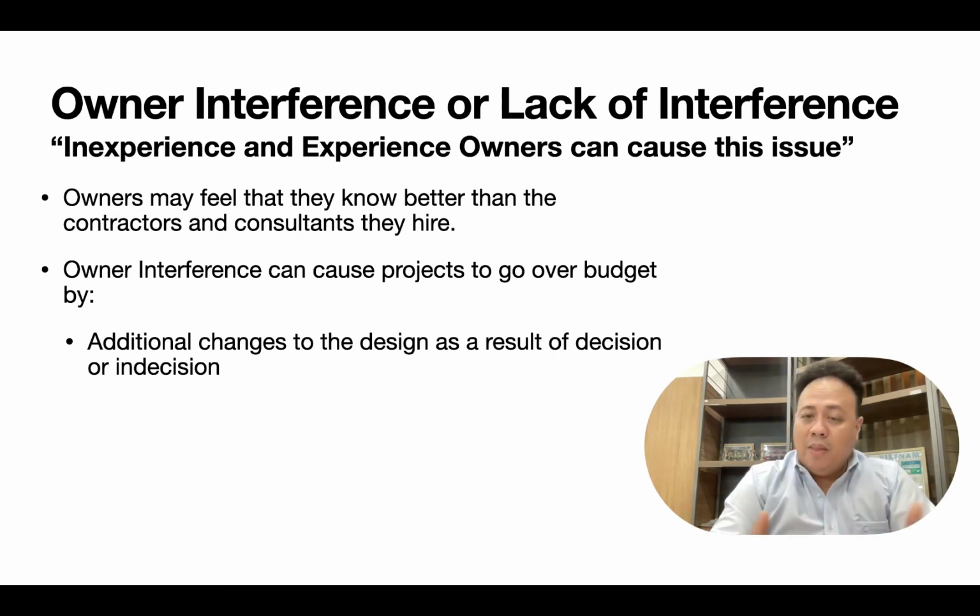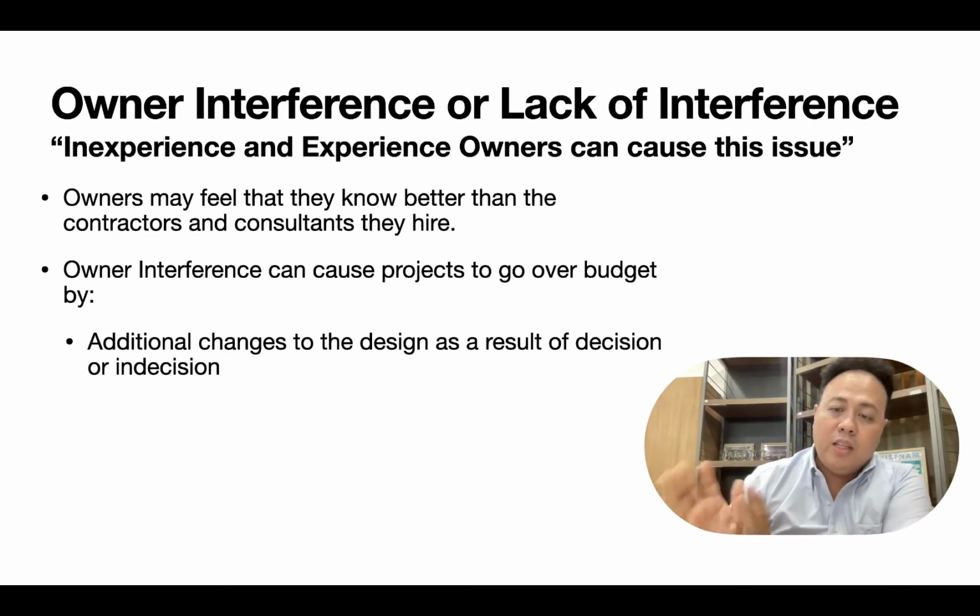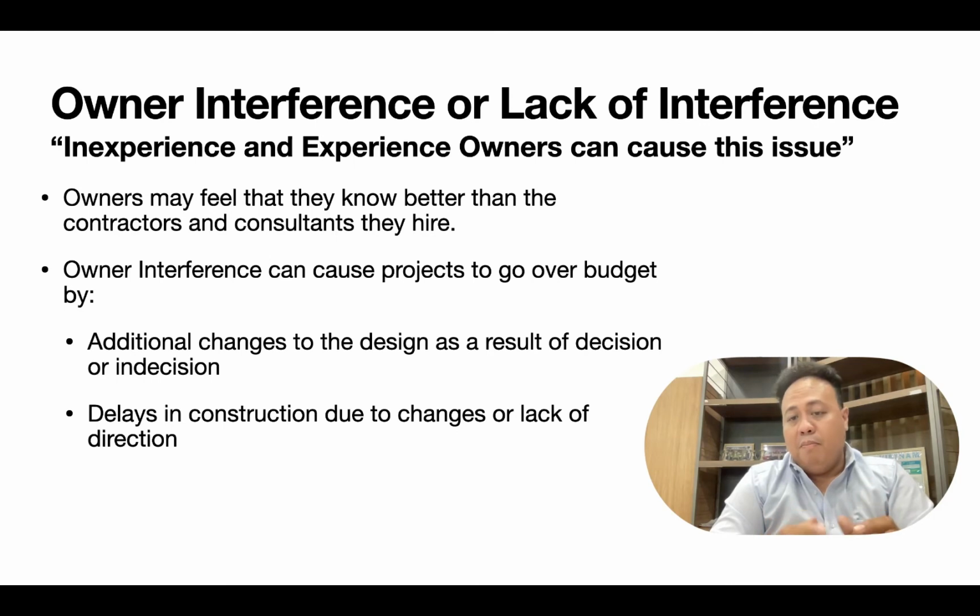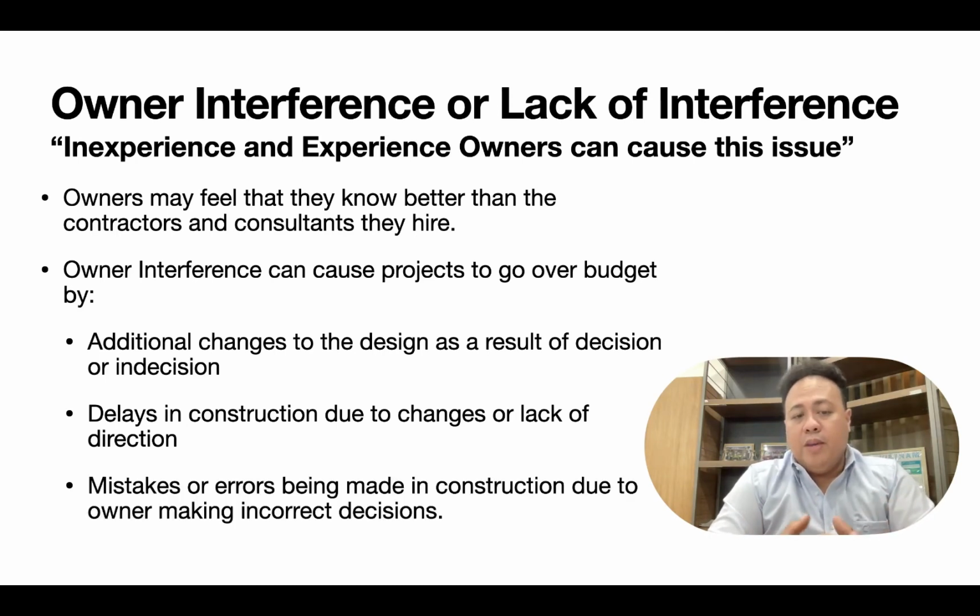It depends. But at the end of the day, the works on the job site will have to stop before further confirmation of the new design cost. The job site may stop work temporarily while waiting for confirmation of the change order. Mistakes or errors may also be made in the construction due to the owners making incorrect decisions. This may result if the owner doesn't engage consultants for advice. It's very rare that it happens.